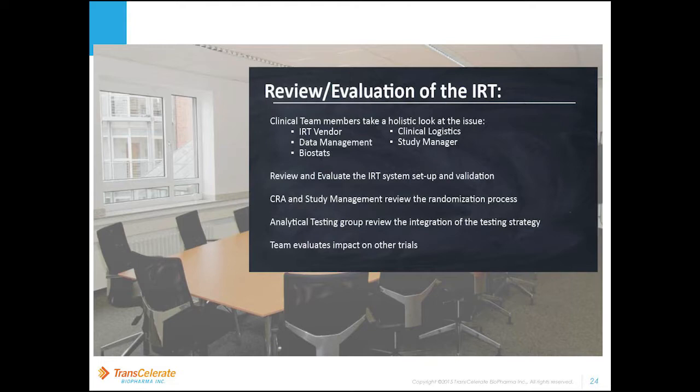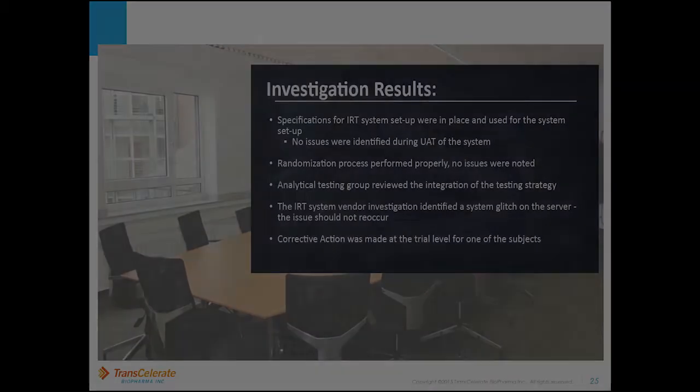Members of the clinical team are pulled together to take a holistic look at the issue. The IRT vendor, data management, biostatistics, clinical logistics and study management review and evaluate the IRT system, setup and validation. The CRA and study management review the randomisation process. The analytical testing group reviews the integration of the testing strategy. The team also evaluates impact on other trials.